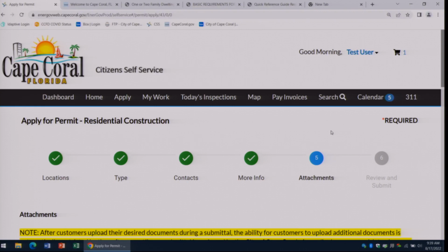All right, so once you have all the documents and it's a complete application package, we send that to the plans examiners for review. A house is going to go through about 5 different reviews. It's going to go through planning, building, zoning, customer billing services, that's for your utilities, and stormwater. Sometimes you'll also have an environmental review if you have one of those species on site. So there's a lot of reviews it has to go through, and a lot of different departments that your application is going to go through.